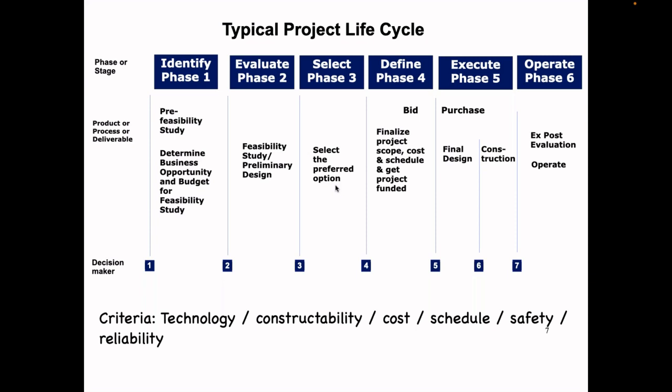This slide shows the stage gate process of the project life cycle. It takes money and time to work your way through, but when you get to the end and go for final funding, your scope is well defined. Using this stage gate life cycle, when we said we needed funding of say $20 million, at the end of the project we were always under budget. So when looking at contracts you're preparing, consider what life cycle process the owner is using to develop scope and write your contract documents accordingly.